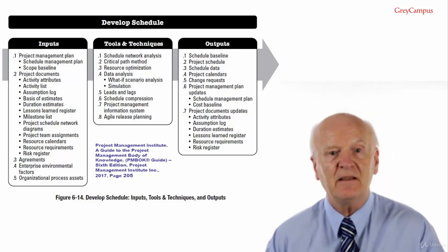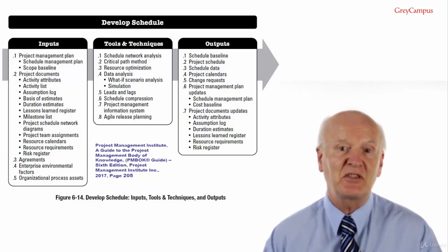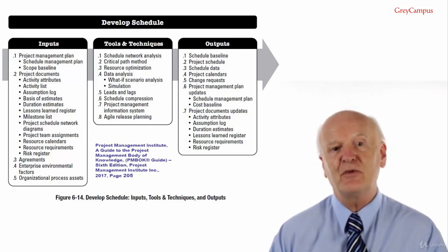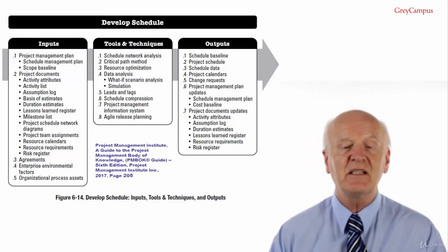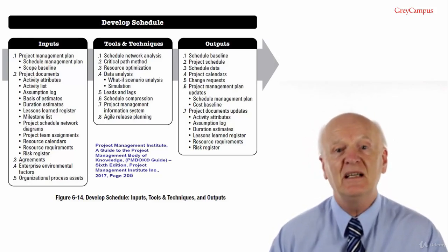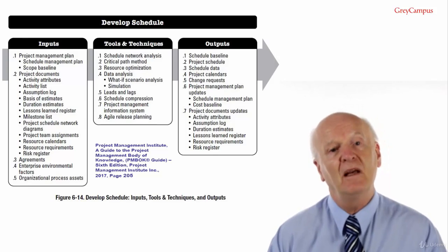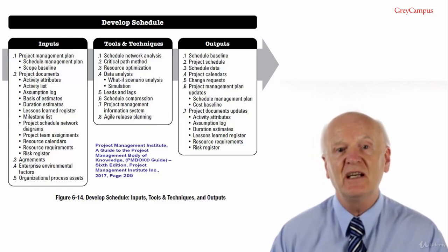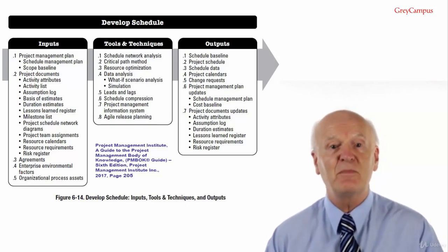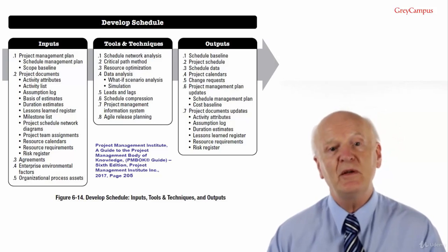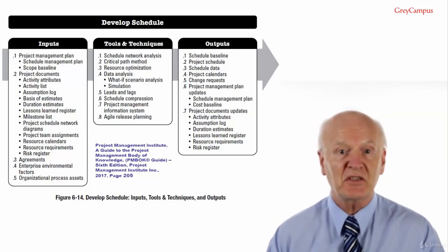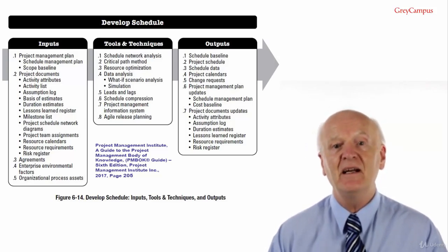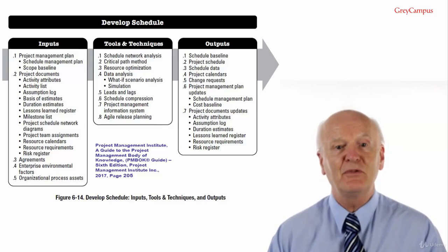We couldn't track anything in that project after the first few changes were approved. We set up translation charts and tried to allow for all sorts of changes without changing the baselines. It was a total mess. I left after a short while. The organisation, a large organisation, no longer exists. The consultant killed it off with his bad advice, and he's probably still being paid 4 times my salary to cause disasters elsewhere. Your baselines must reflect reality. They must reflect your approved changes.